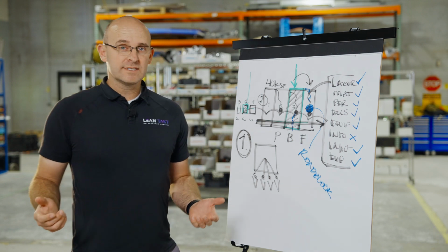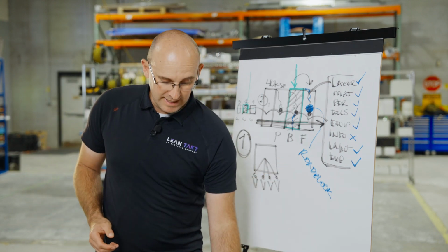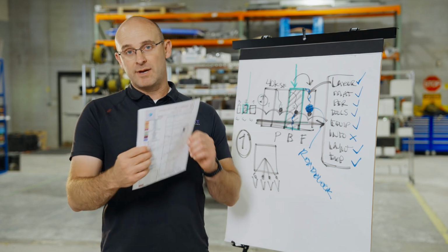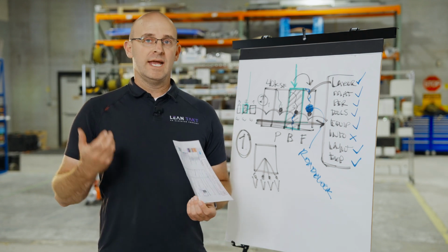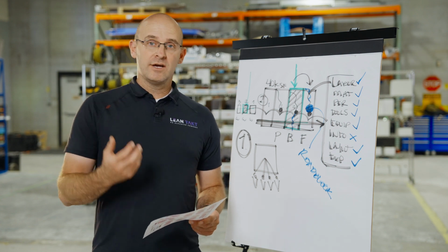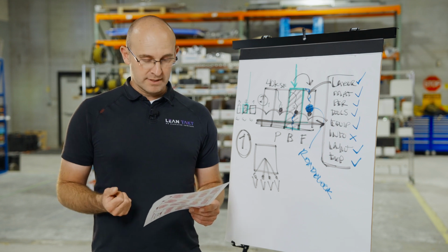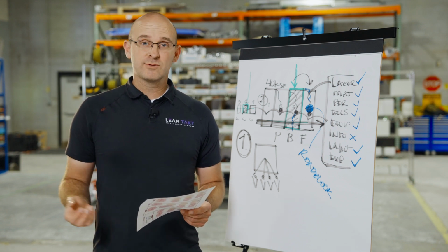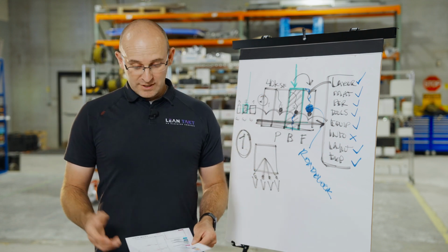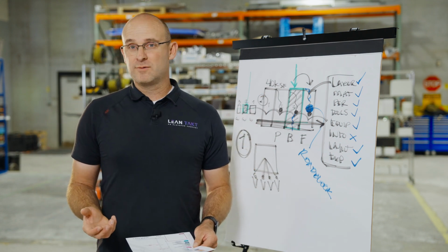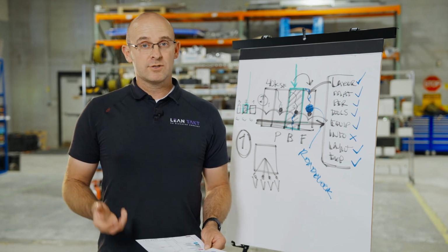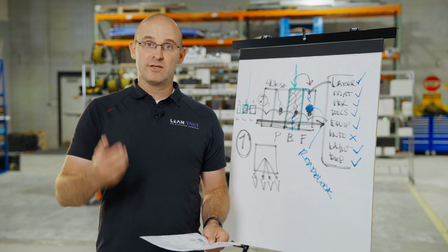And lastly, what I want to say as a part of this system, and again, if you're using these weekly work plans and these zone maps like I'm asking you to, report this in the afternoon foreman huddle every day and say, here are the problems, here are the handoffs, here are the roadblocks, here's the preparation, and here's what I'm seeing. And oh, by the way, I'm seeing some problems with our flow principles. If we start looking at this, we'll create so much flow and make so much money, we're going to make all your competitors look bad. So these are the things that you should implement and look for in the field.